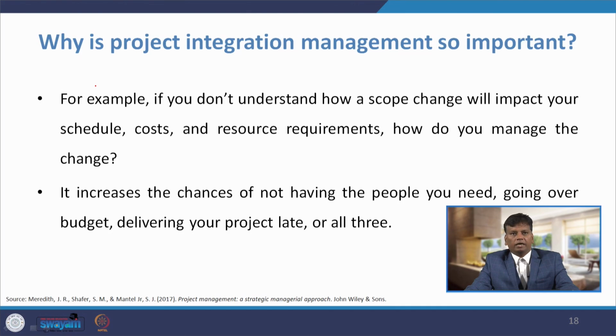Now, we will discuss why project integration management is so important. For example, if you do not understand how a scope change will impact your schedule, cost and resource requirements, how do you manage the change? It increases the chances of not having the people you need, going over budget, delivering your project late, or all three. So, you have to understand the impact of one activity on other project activities. That is why project integration management is required.